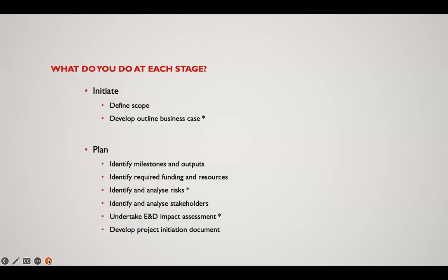And at the end of the day, because of the PID, which is the project initiation document, at this point this is where you will develop your schedule as well. The plan you will develop, the plan you will set as a baseline to monitor the progress of the project, to monitor and control the project throughout from the execution to the end.